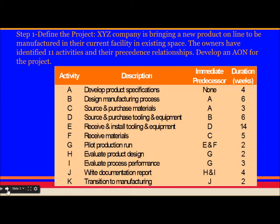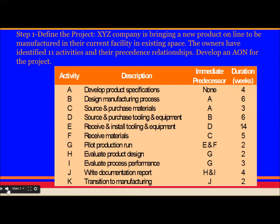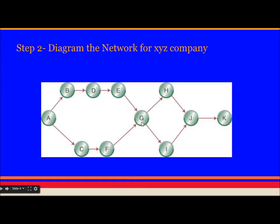Let's move on and draw the network diagram. Activity B and C can only start when A has completed. D can only start when B has completed. F can only start when C has completed. Similarly using this table, we can construct the network diagram.